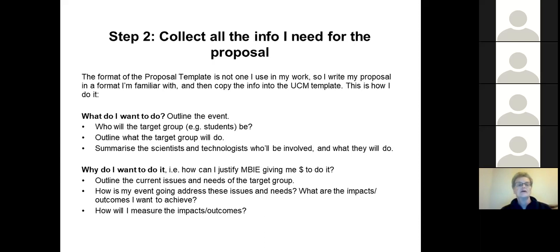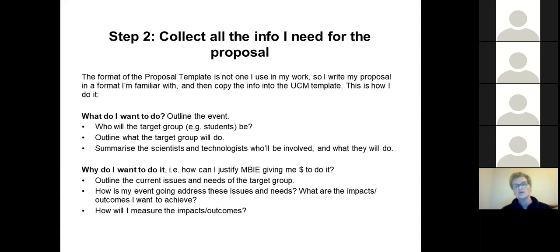The first thing I do is write an outline of what I want to do, who's going to attend the event, what they're going to do, and I summarize the scientists and technologists who will be involved. That's like the introduction or background. Then I go into detail on why I want to do it and how I'm going to justify MB giving me money — I outline the current situation, the issues and needs of the target group, how my event will address these, what impacts and outcomes I want to achieve, and how I'm going to measure these — for example, using SurveyMonkey.